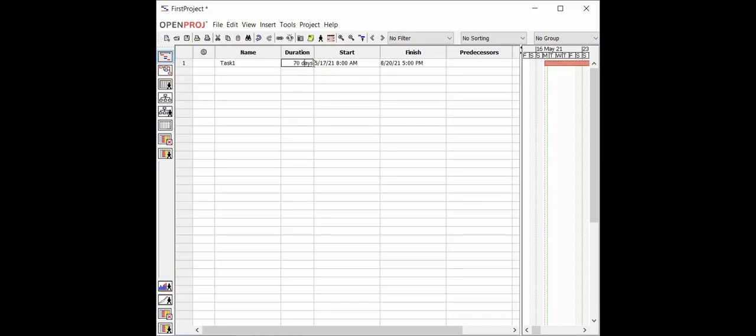I change, and I can type, let me say 14 hours. If I say 14 hours, that means 1.75 days, right? So you can use either D for days, W for weeks, and H for hours, right? So even though you have used D or W or H, at the end, the result will be displayed in days, right?